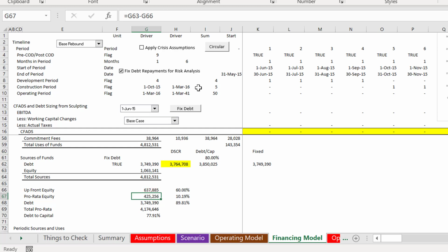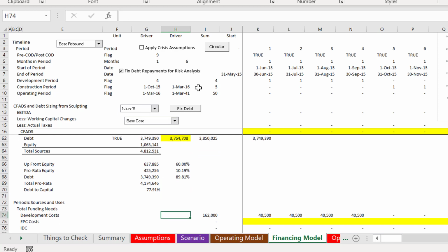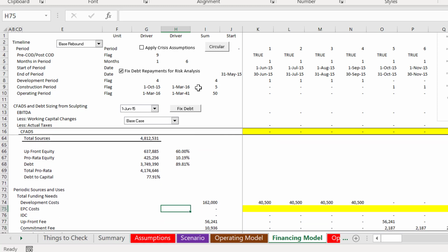So now once we have the amount we put up front, this was our upfront equity, then we can take the difference and get the pro rata and the total debt we get from here. And then we can say, okay, well, the total pro rata that's not upfront is just these two, and then we can divide that total pro rata into two things. That's Hetty did that, and it's really a great innovation, I think.